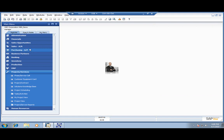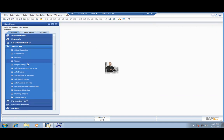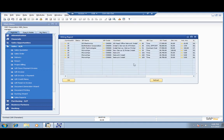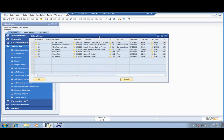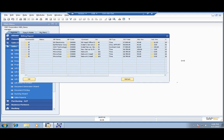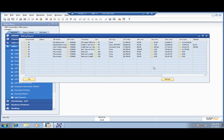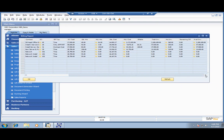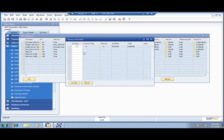Following up on that, we can come over to the sales side and run our project billing. This helps us be proactive on the invoices we have with our customers. You also get your over-under reporting with actual hours, estimated hours, estimated costs, and actual costs. Moving all the way to the right, you can see the invoices we can process — simply drill down on the invoice and enter it into the system.